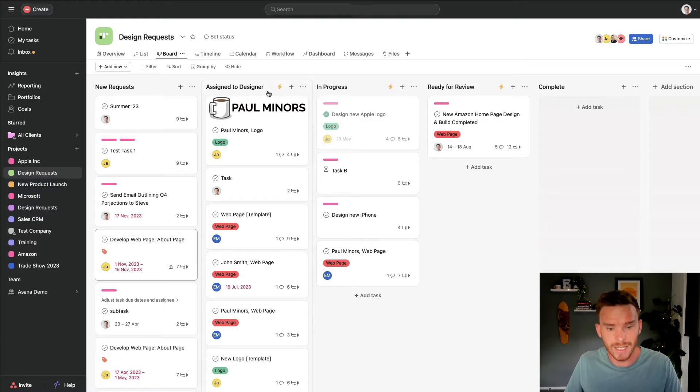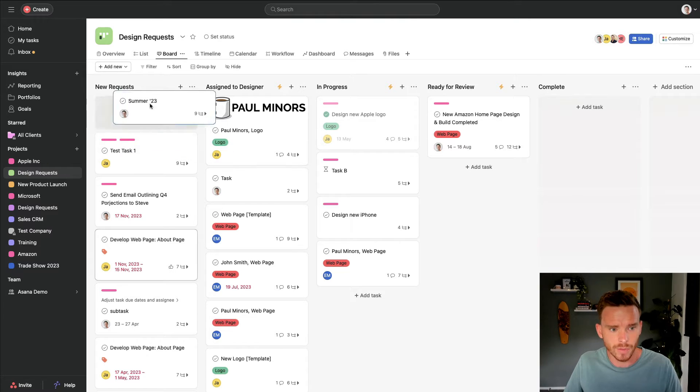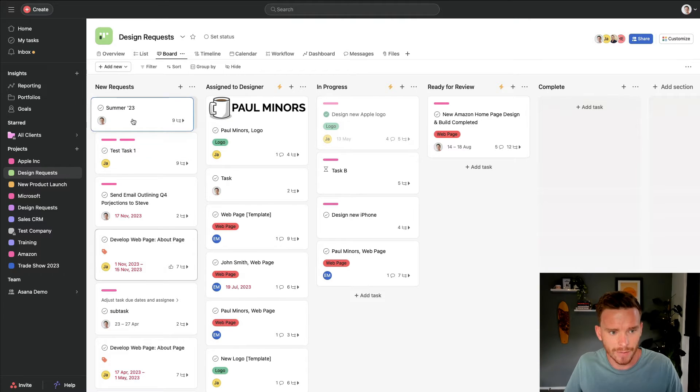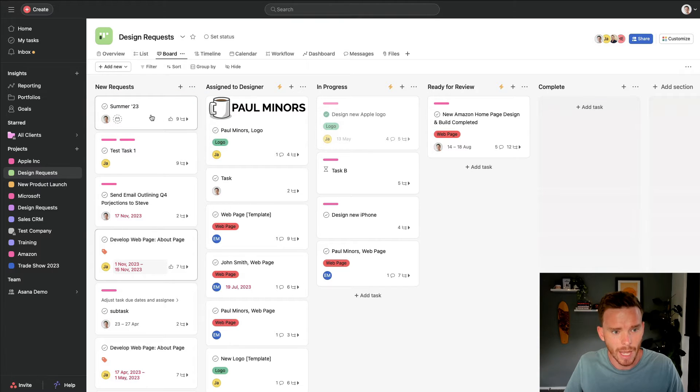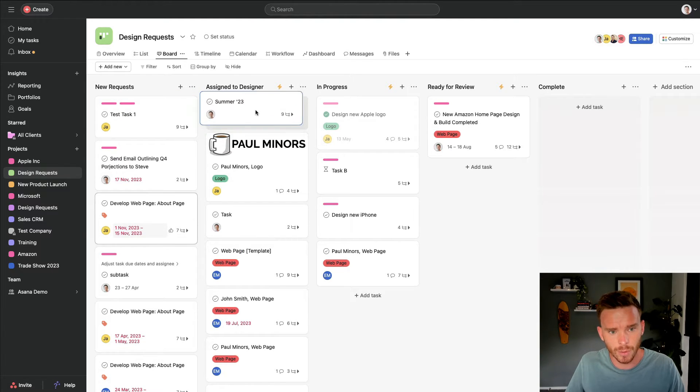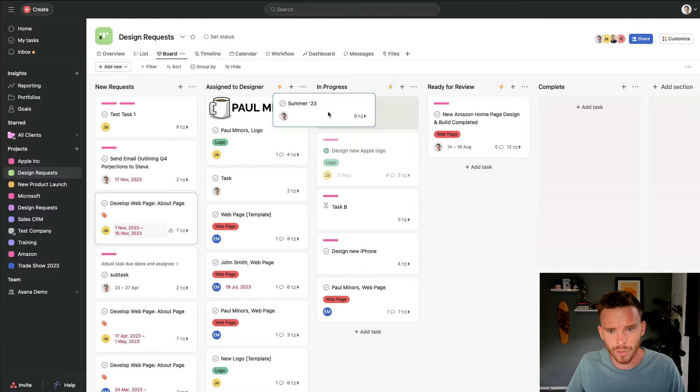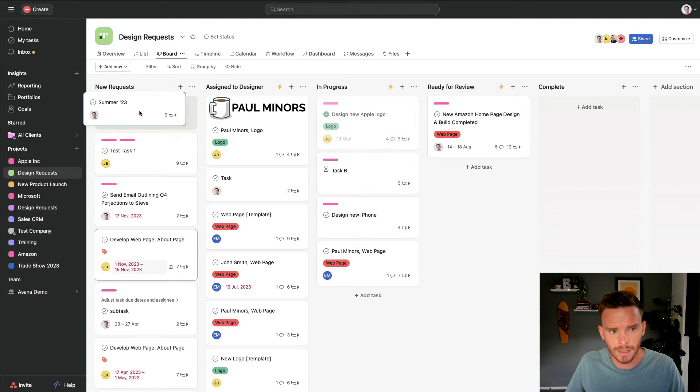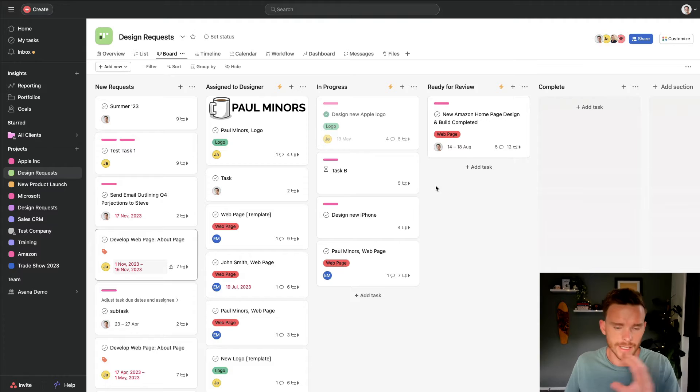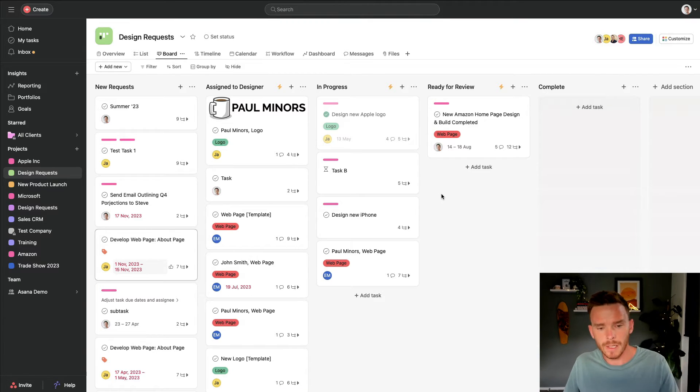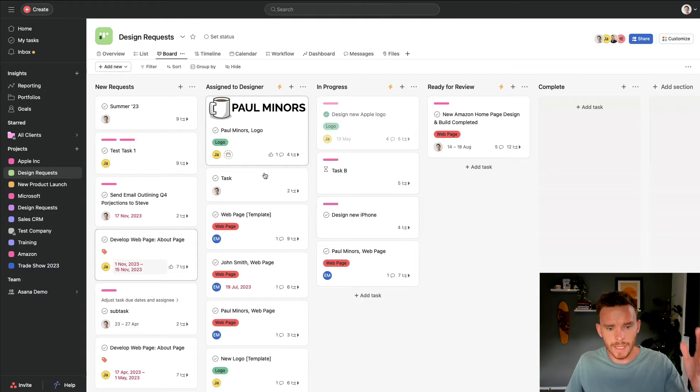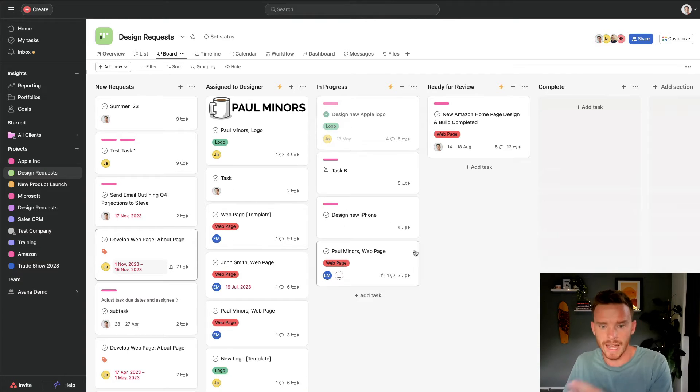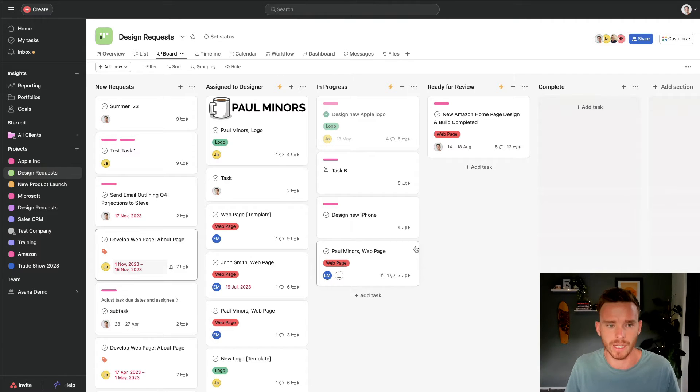An example of that would be design requests. It could also be bug tickets, support requests, where I start off a task on the left hand side. You can see I've got this section for new requests, and then we move the task through sections for like assigned to designer, in progress, ready for review, and then complete. I find the board view works well for these process workflow projects, because we can easily see how many tasks we have at each stage in the process, and where a backlog may potentially be occurring.